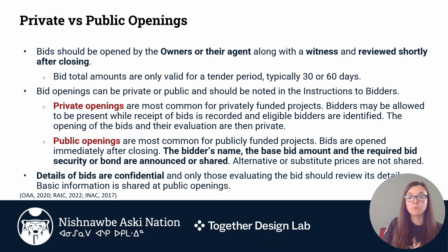Public openings are most common for publicly funded projects. Bids are opened immediately after closing. The bidder's name, the base bid amount, and the required bid security or bond are announced or shared. Alternative or substitute prices are not shared. Details of bids are confidential, and only those evaluating the bid should review its details. Basic information is shared at public openings.